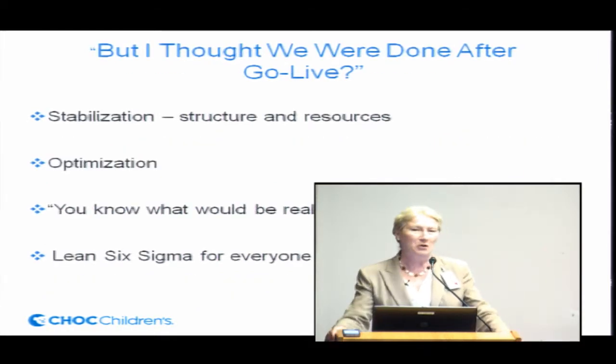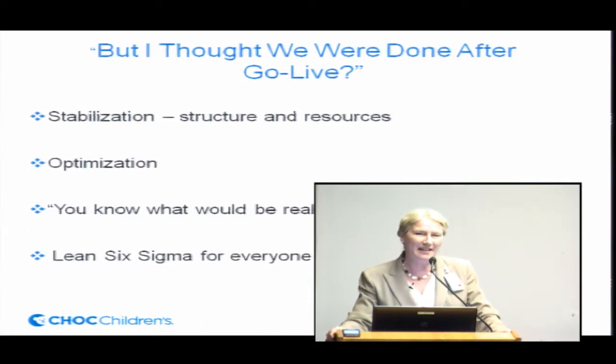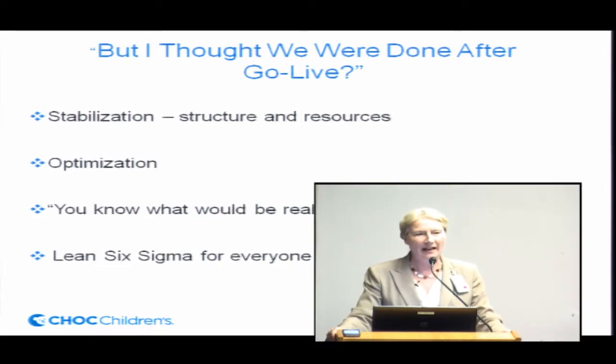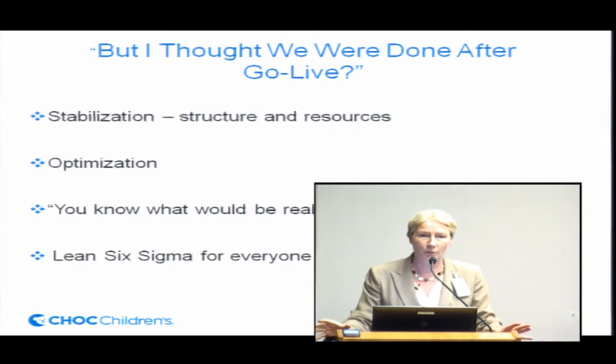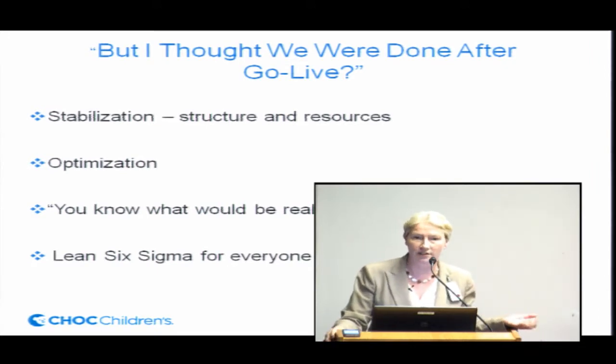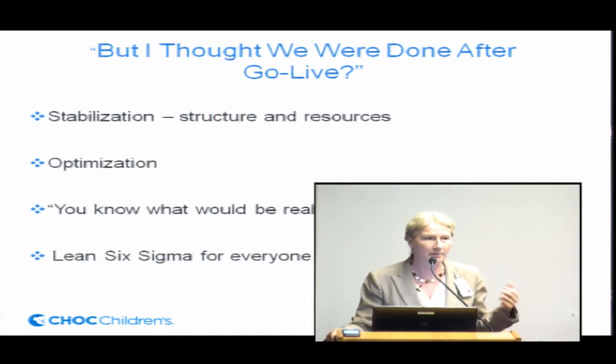But I thought we were done after go live. Well, I've been saying that for the last month. You have to stabilize. Stabilization takes time. And the departments that we opened up at CHOC were all physician-driven procedural type departments, which is a very different beast than inpatient units, where the physicians come and go. They're really nurse-driven units. These are physician-driven units. So physicians have lots of opinions about the unit and how it's working because they're working in it. Very different. And so it does take time to stabilize.